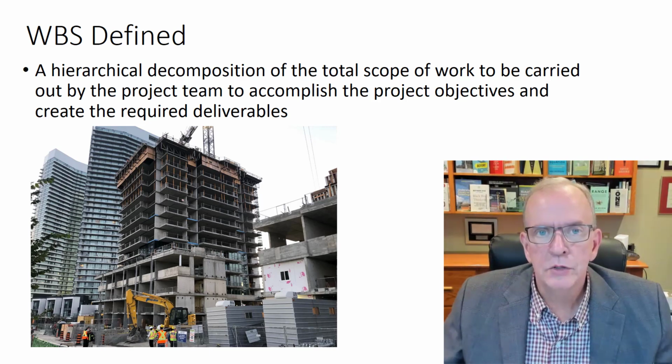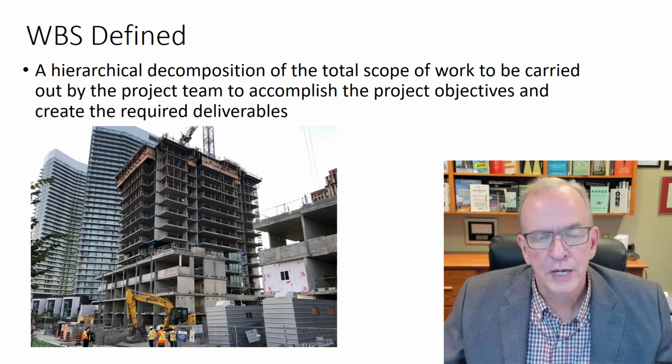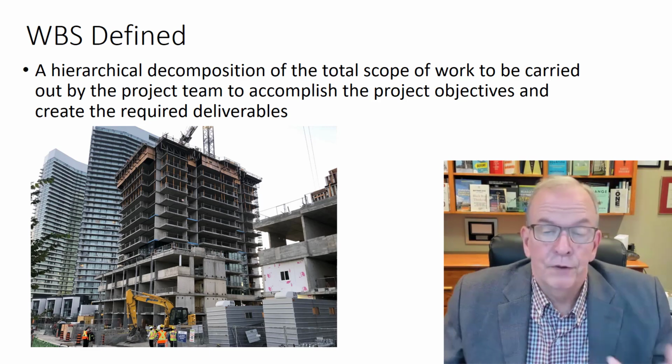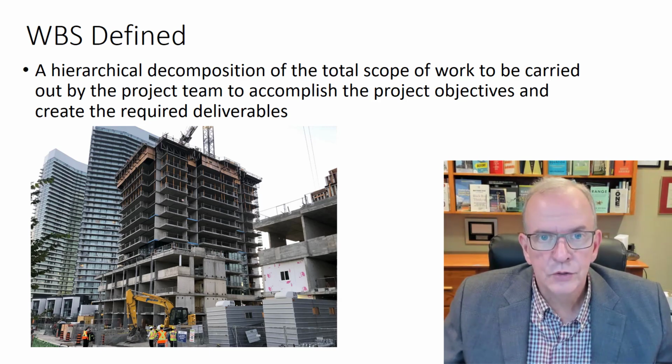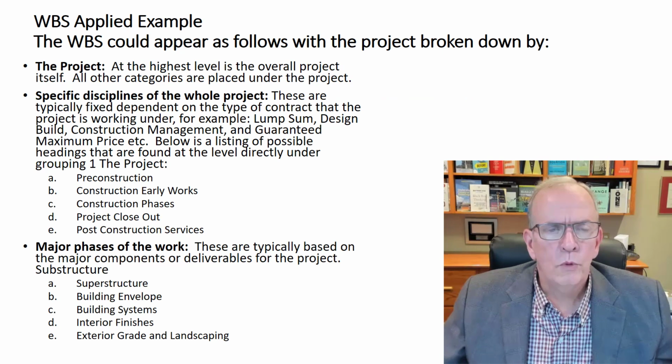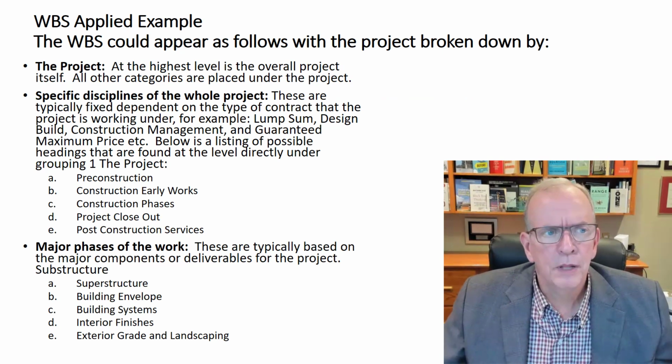It also allows you to track costs. You can track costs and apply costs according to your schedule of values and develop your schedule of values from that. It can be very useful for cost control, construction cost monitoring, and for defining your schedule requirements. So I have a little bit of an applied example that we can use here.